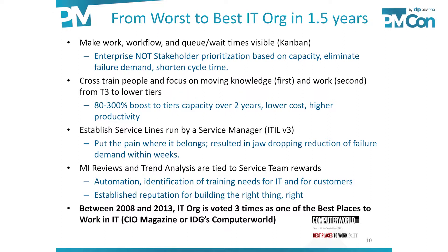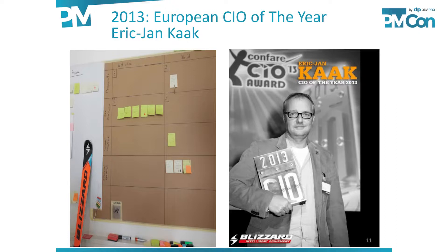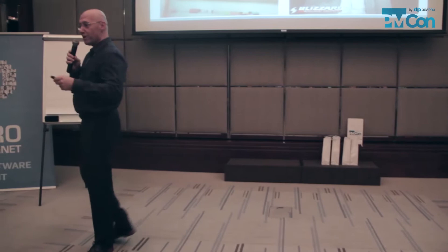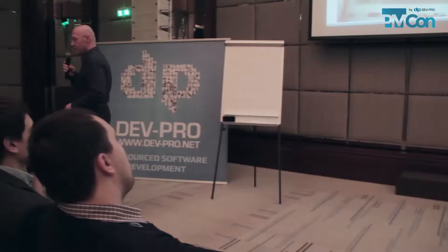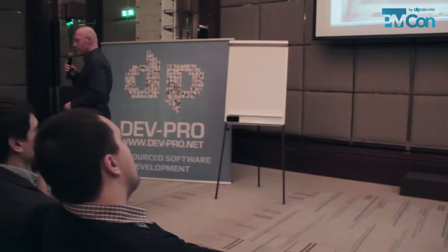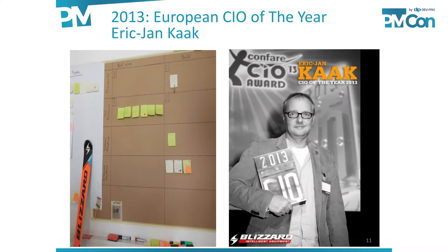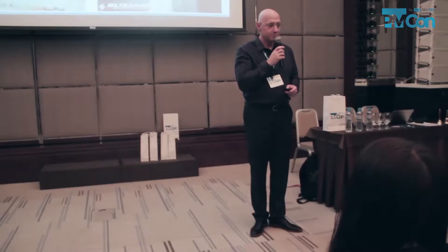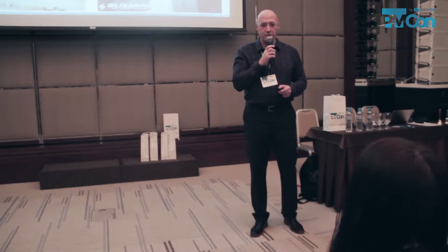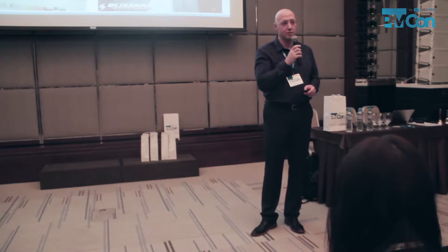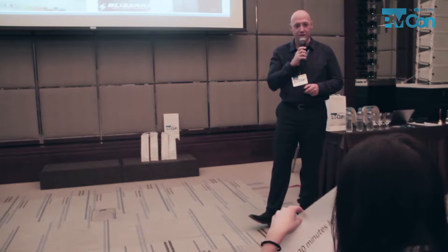Everything that the team worked on was an escalation — something in production was not working and someone was screaming. It took about a year and a half to completely turn this around. This is one of your European neighbors who won a CIO award in 2013. That's his Kanban board — he started it on wrapping paper, then graduated to a cork board, but they did a lot more than just putting things on the wall.